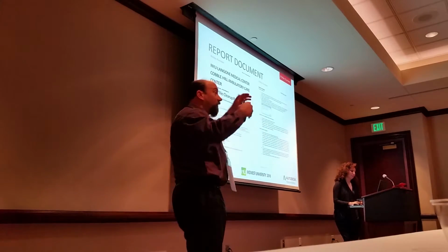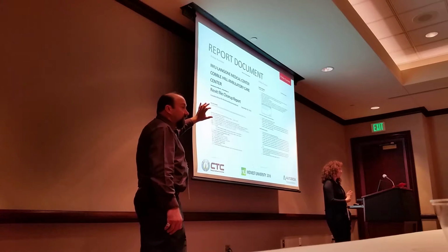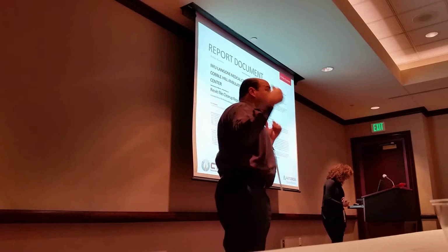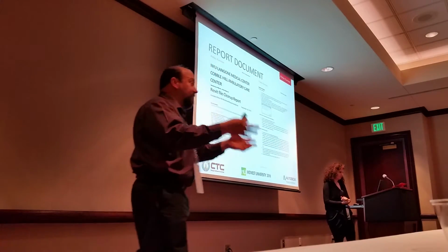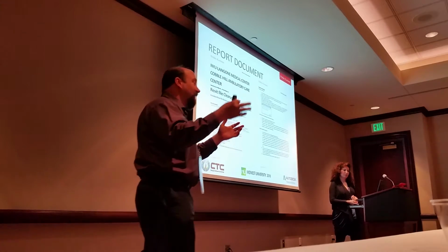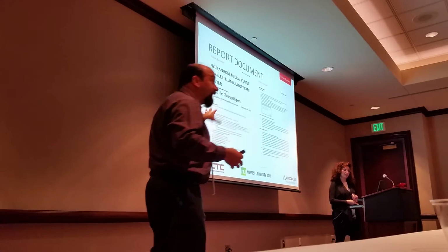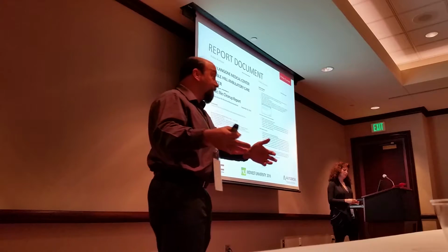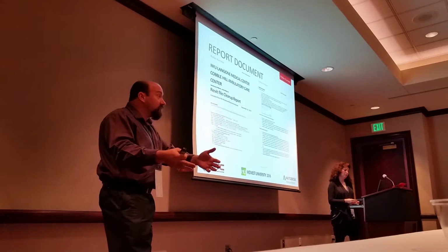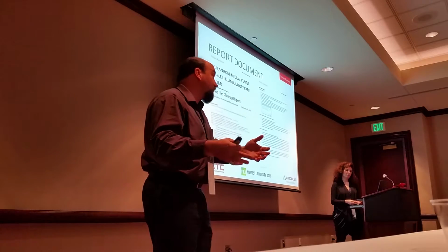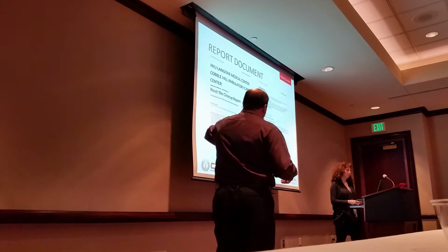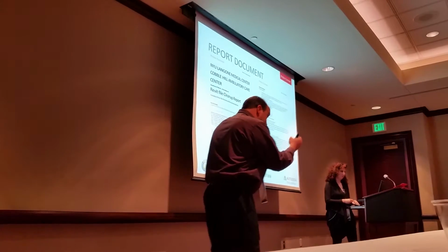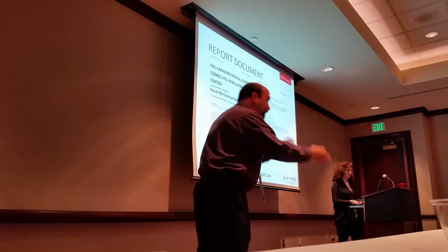In that report, basically we have the main page of the report, which most of the higher level staff who need to do the staffing assignments use. They say, okay, this cleanup is going to take 40 hours, assigned to the project BIM manager, the BIM liaison, whoever, and they're going to be assigned the task of doing the stuff that is urgent and the stuff that will improve performance.